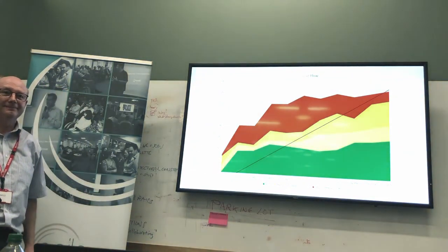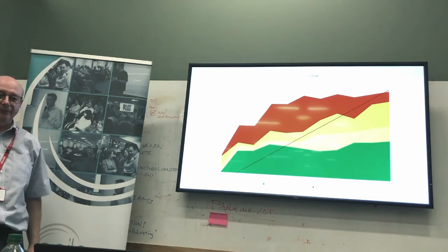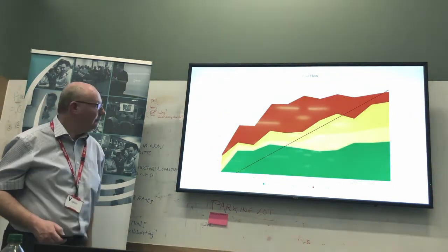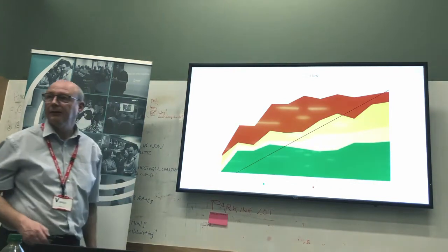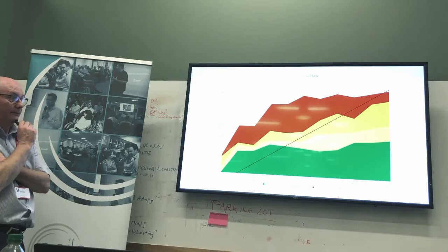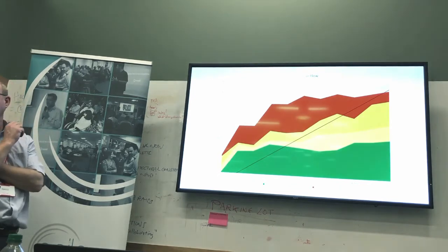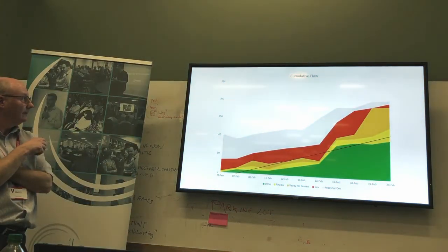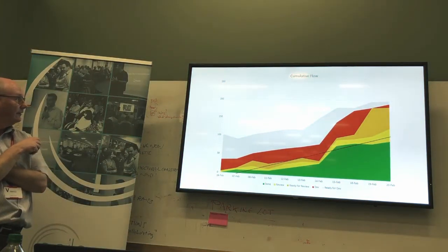Sounds too familiar. Yeah, we've all experienced that, haven't we? But yeah, it just got completely out of control. So for me, it's about focus, and if I was a Scrum Master for this team, I'd say first of all, you haven't got focus. You haven't got a sprint goal, because things keep going up and down. Your WIP limit is really high on both of them.